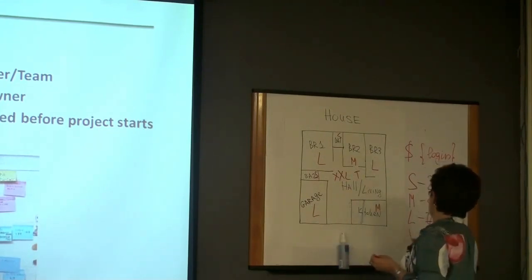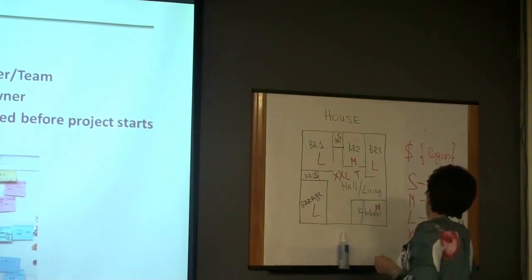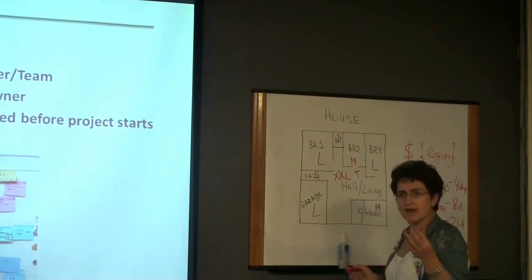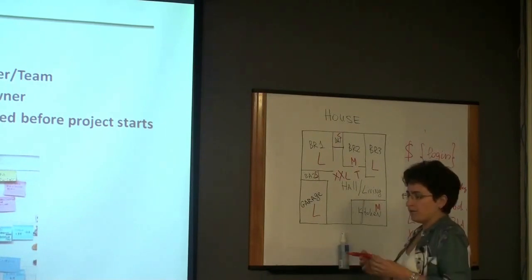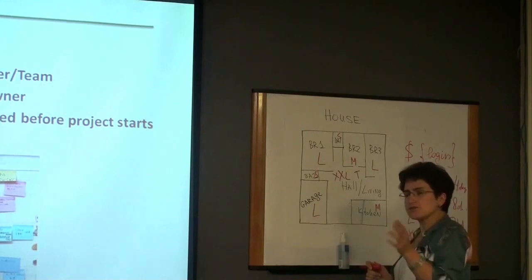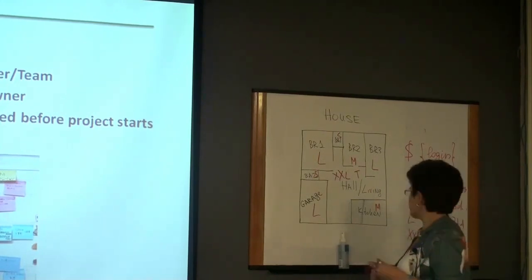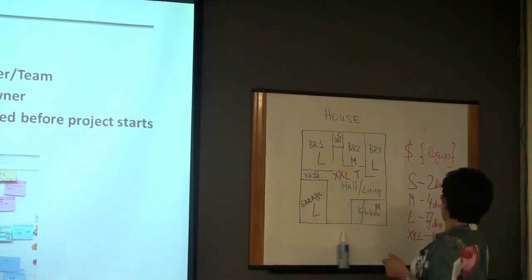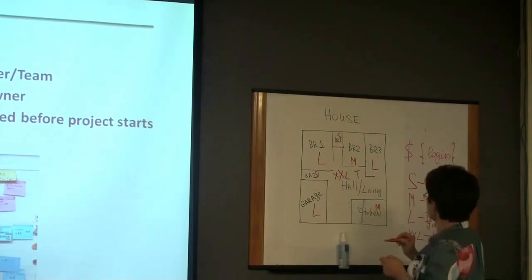Now the biggie, right? The XXL, the living room. 10 days, for example. I'm making the numbers up, but in real life, development and QA would look into the feature itself, what needs to be developed, would probably think through an approximate list of tasks to be run on that, and give this estimate. So this one, we have only one feature, so the total effort is 10 days.